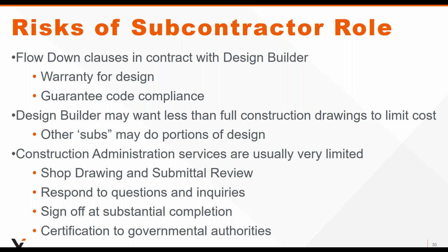Another challenge that you often see is that the design builder may want less than full construction drawings to limit cost. Oftentimes, after the job is won, the design builder may say, well, we will use a specialty subcontractor to come up with the design, and we won't need you to develop that portion.